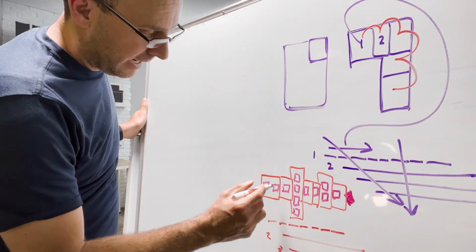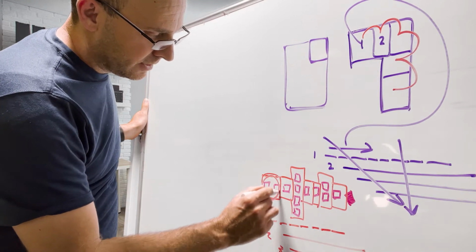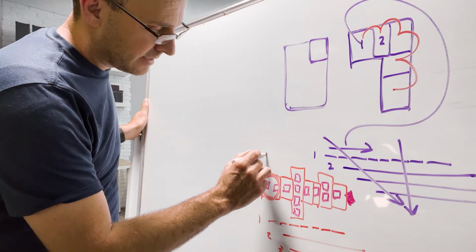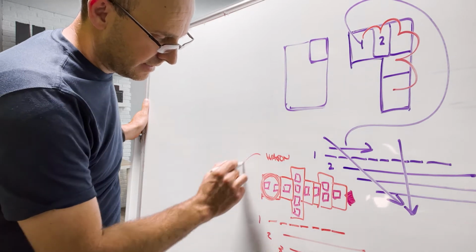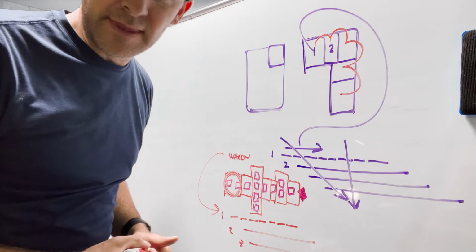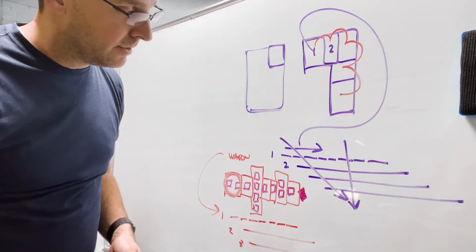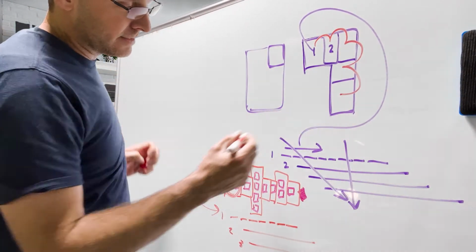But this pull plan, portions of these, you package these work packages into a takt wagon, and that then summarizes the takt train. So there's really pull planning. If somebody told me, hey, we're doing pull planning for the other areas, great. Pull plan to create your takt trains. And so then you can break this up.